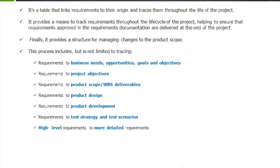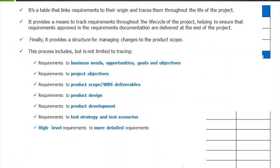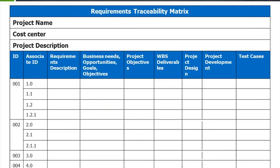We saw the requirements management plan and the requirements traceability matrix. The requirements traceability matrix provides a single document to ensure that all the points agreed or approved as requirements are being considered and taken care of across the life cycle of the project.